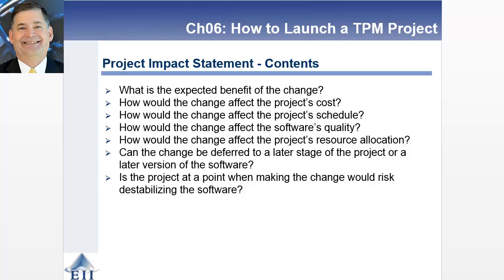Let's talk about the project impact statement. Once you have some understanding of what the requirements are associated with a scope change, you prepare an impact statement. What you're really looking at is the advantages and disadvantages of making the change — how it's going to affect the project in terms of new functionality, project cost, schedule, and software availability.